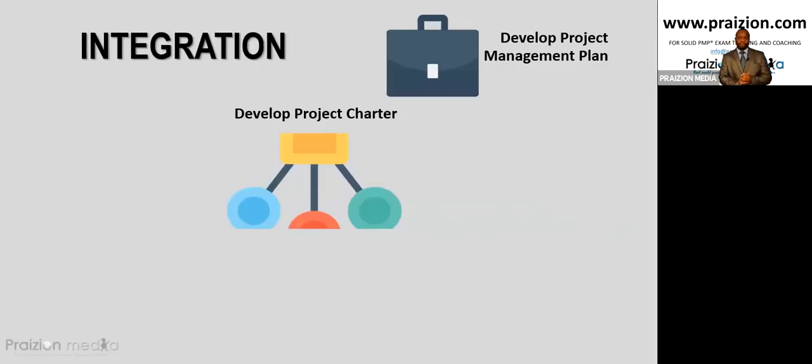Develop project management plan is our next one here. And this brings all of those subsidiary plans I just mentioned, brings them all together, binds them, puts them under one roof, and makes sure that they're talking to each other. If your schedule baseline is not talking to your cost baseline, it's not talking to your scope baseline, you're going to end up having no baseline. And that's why the PMB is based on the integration of these three. There must be an integration, all right?